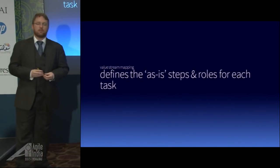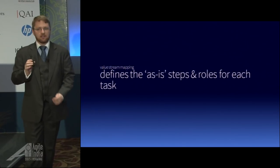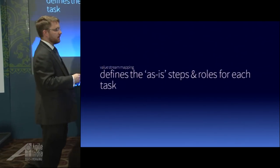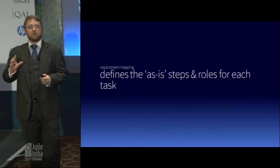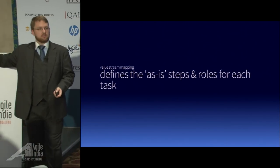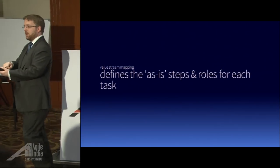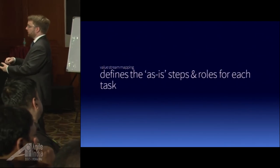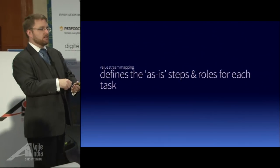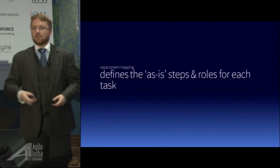So what exactly are we doing for a value stream map? The key word here is 'as is.' We are not defining an ideal state — we're not defining what we want the process to be. We're defining what the process is right now. There's a term when you're doing a value stream map called 'walk the shop floor.' It comes from manufacturing, where you would take the first piece at the start and literally walk the shop floor, following this widget step by step as it was touched — who touched it, how long was it touched for, what did they do to it — until those raw components came out at the end as a car or whatever you're building.